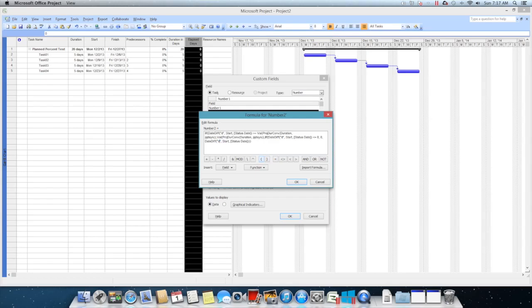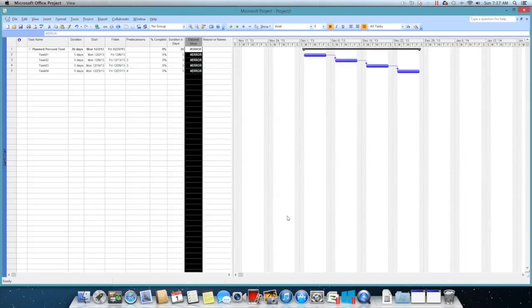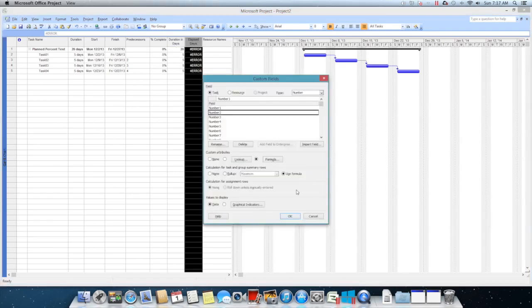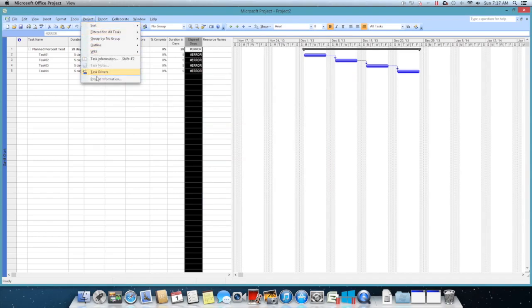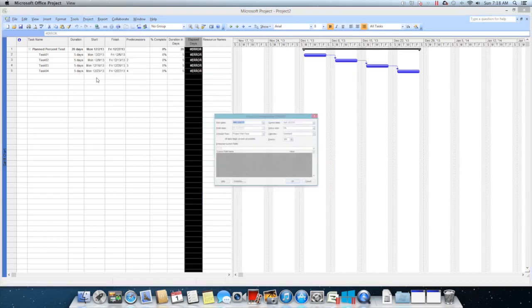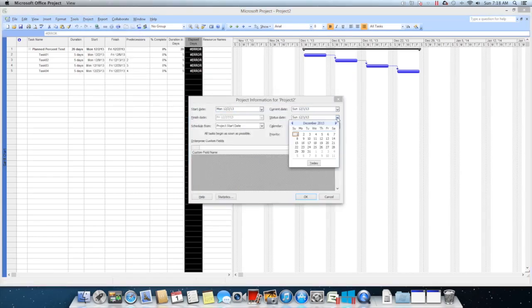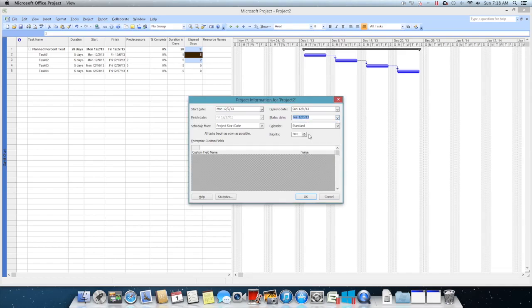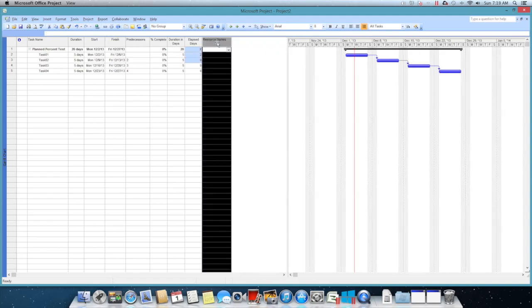I'll do the same thing again here. Click OK and use formula here. Click OK. Now you notice that it has given me error because I have not set the status date yet. So let's go and set the status date. Since the project is beginning on Monday, let's maybe third. So on third we have completed two days. Now we have the elapsed days here.